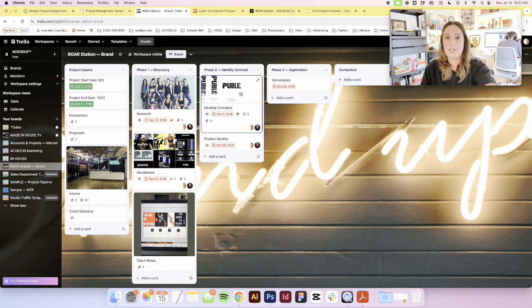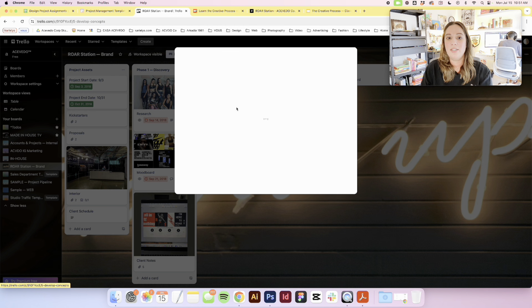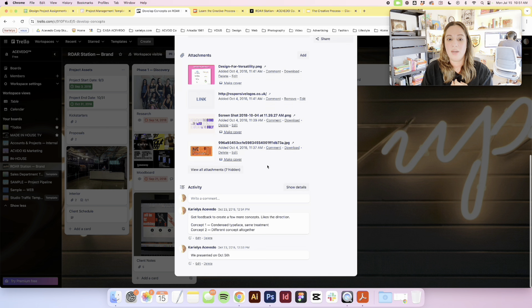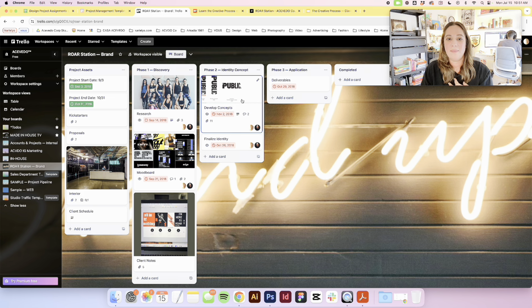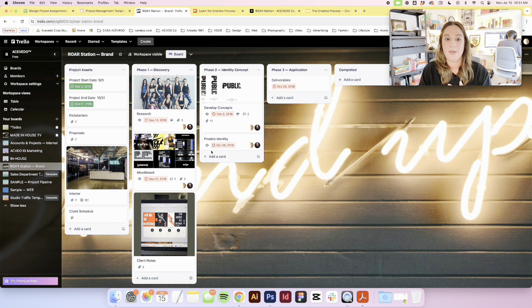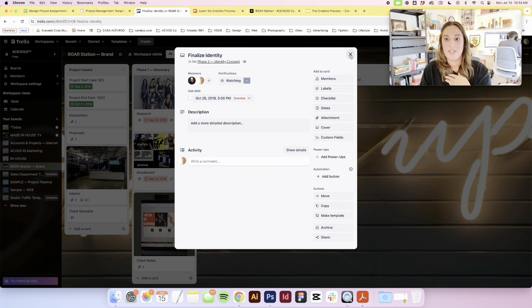but then I would start building cards in my phase 2. So then I go into developing concepts once we get a mood board approved. I would start working on those concepts, and then any notes related to that, we would add here. See, I put we presented on October 5th, okay? And if you notice here, we documented the client feedback as well. And then once we have concepts, the next thing would be to finalize the identity. So here we develop concepts, we pitch, and then once the client approves the logo, we go into actually finalizing that, and that's what you see here.